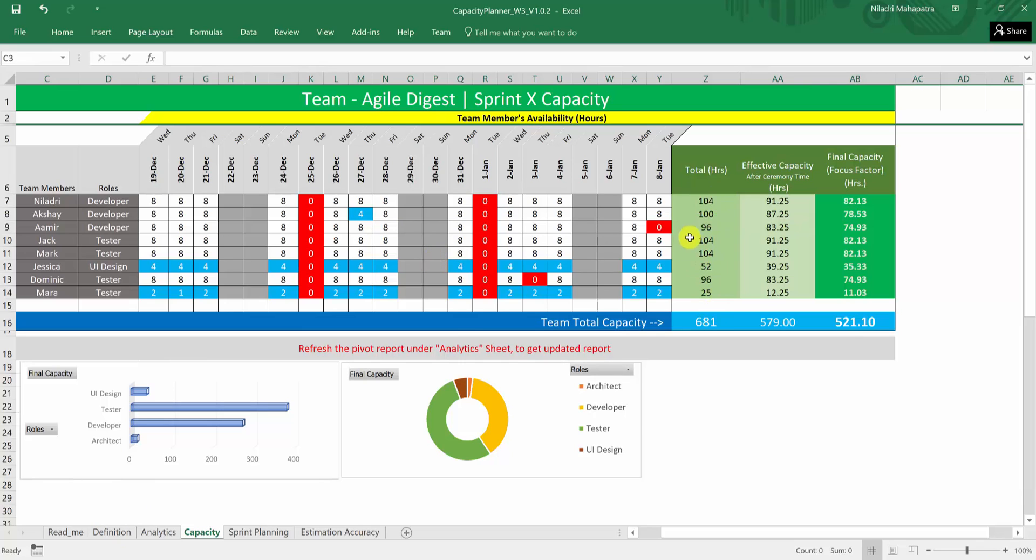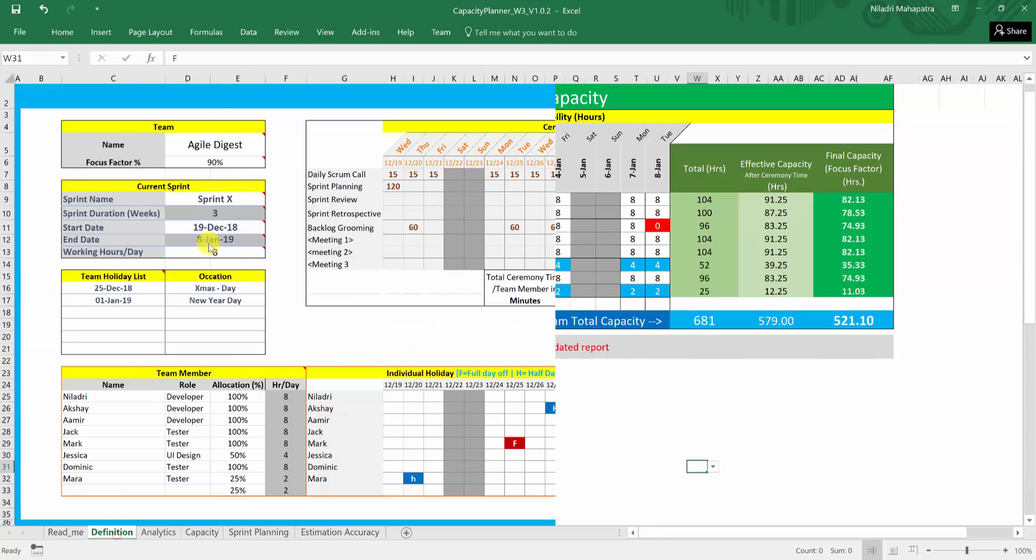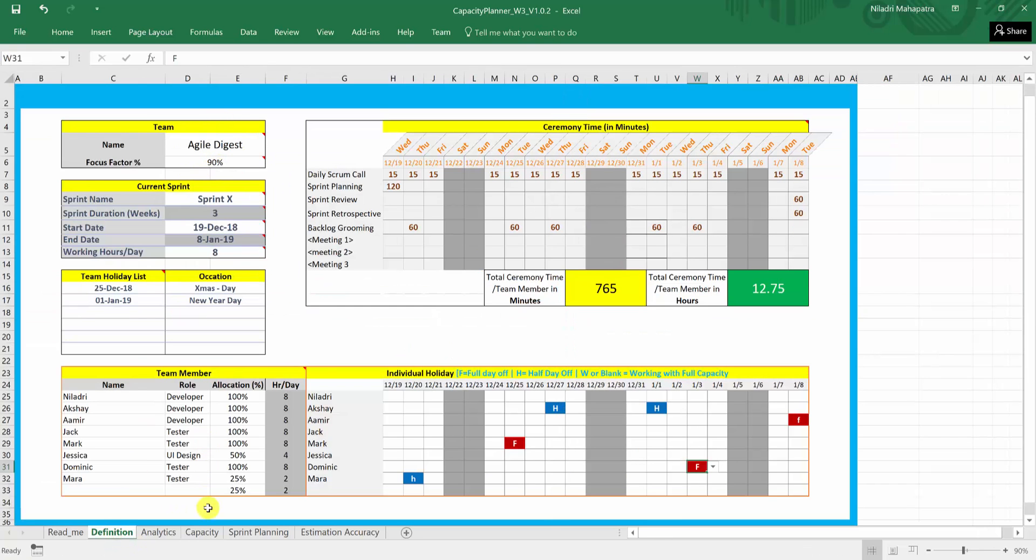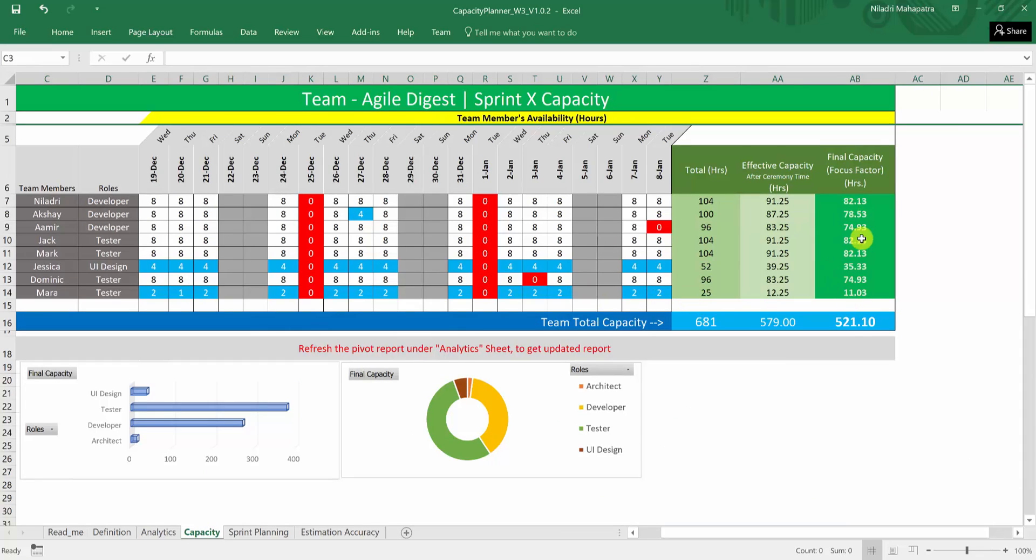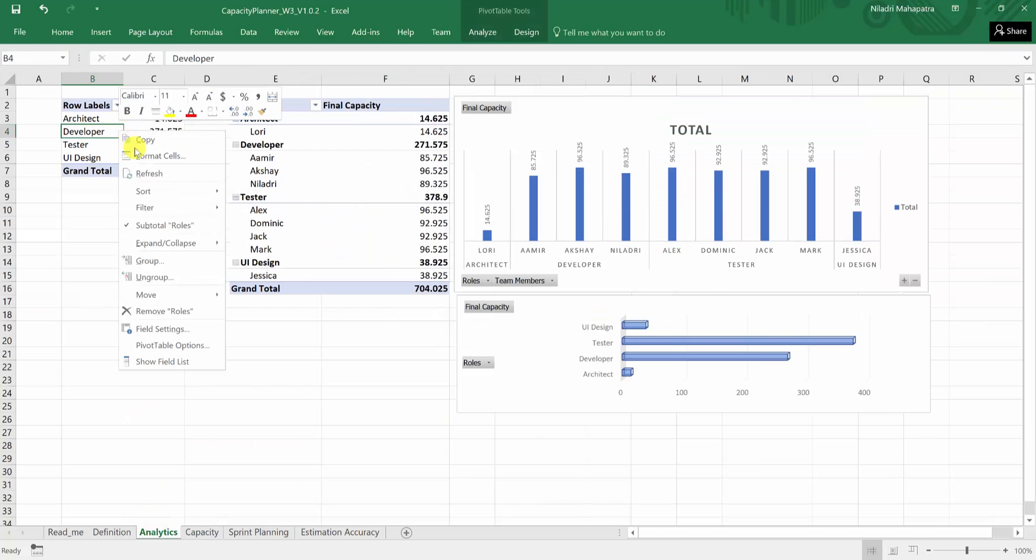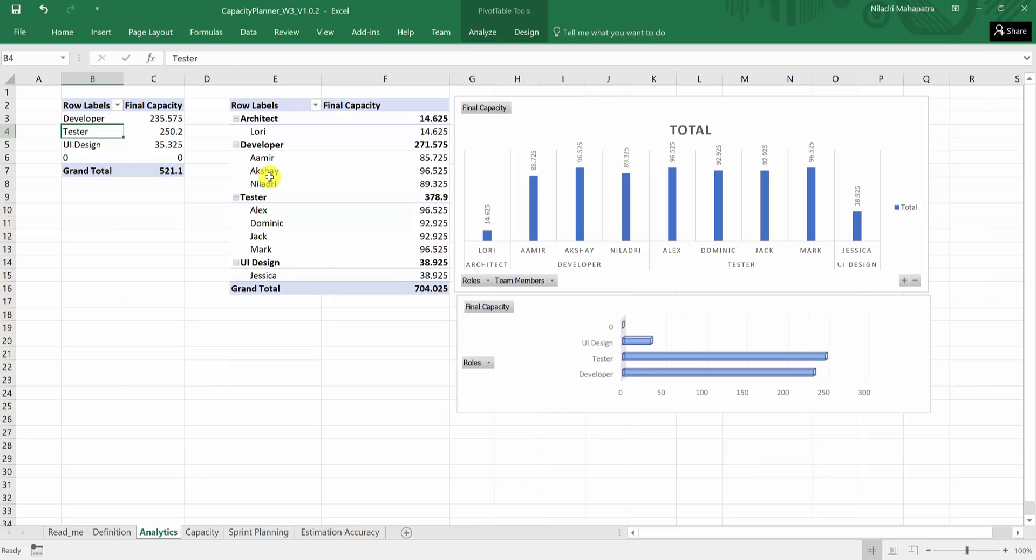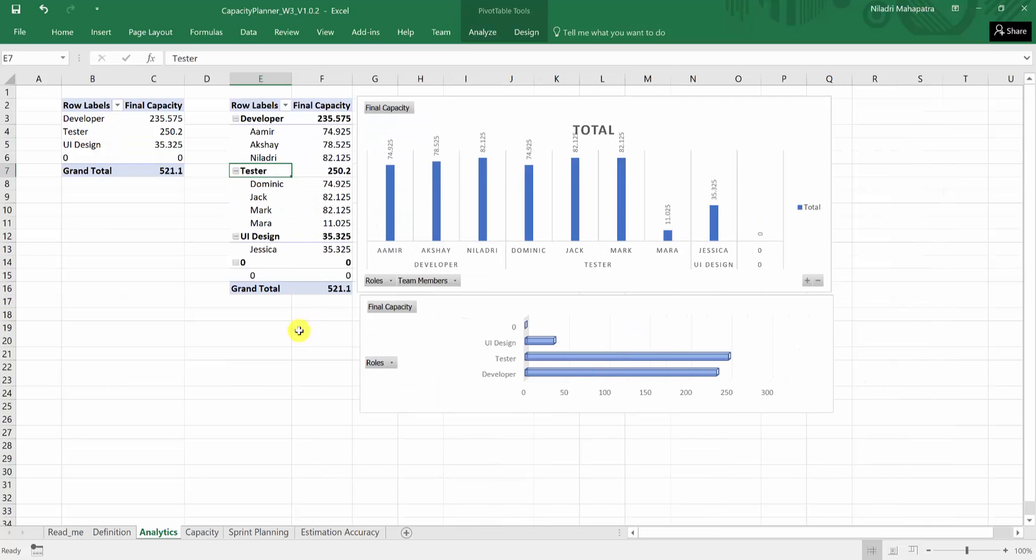Now the total hour is coming up this and effective capacity after ceremony time. So whatever the ceremony time you have calculated based on that it shows okay this many times you will be having effective after calculating the ceremony time and the final capacity what you see that is focus factor we are actually calculating this number with that 90 percent we had here. So this 90 percent is actually calculating and giving you the focus final capacity. There are two graphs here that is coming from the previous worksheets. It shows on the roll wise how the capacity is distributed and you can actually right click here and refresh it because pivot table needs to be refreshed and it will be changing it accordingly.